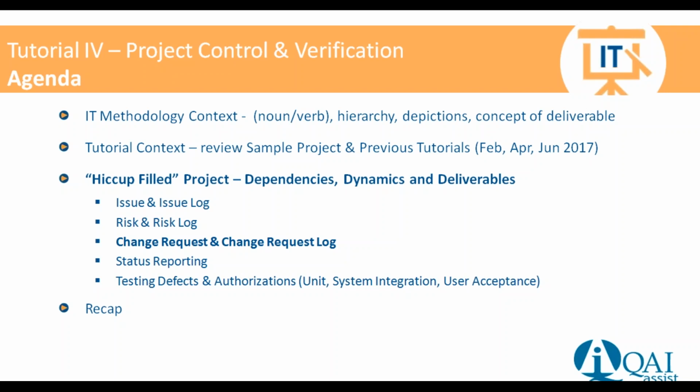Now, as we go through the testing, we may incorporate these changes into a current version that we're developing. We may be able to say, no, we're going to lump all of these change requests into a new version which we can build later. Irrespective of how we want to handle that, we need to document what the change request is of the functionality. And we also have to keep track of all of these changes in a log.